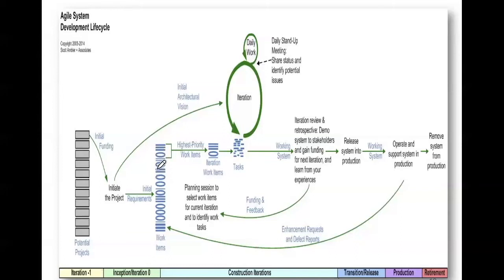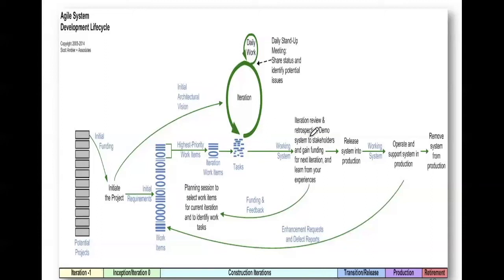You then take the next highest priority requirement or subset of requirements and go through design, implementation, and testing again — a building cycle. You're taking the second batch of requirements and adding them to the product you've already developed, building the product up. You deliver and show that to the client, and on it goes until you deplete the full set of requirements. Design, implementation, and testing of small units is repeated — with testing and demonstration to the client happening from very early on. That's what characterizes agile.